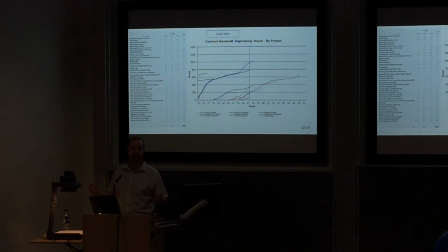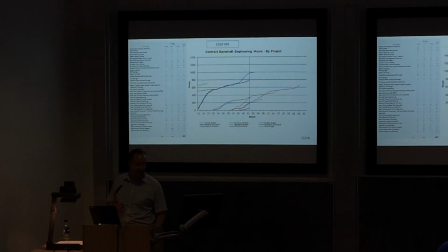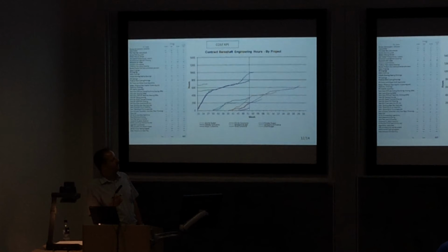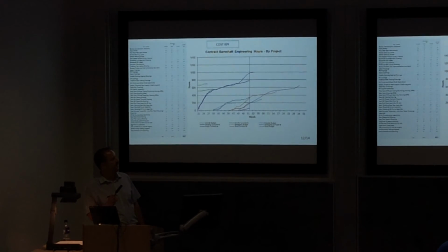The testing, however, does need to be done 20 times, because if we've completed a component and there's a large engineering element to it, then the customer will specify the amount of testing he needs to see on it. What we see on the right, which is a bit more readable, is the graphs that I produced on how many engineering hours I thought it would take for each activity, which is the dotted lines, and the reality of how many engineering hours it took to do the project, which is the solid line.